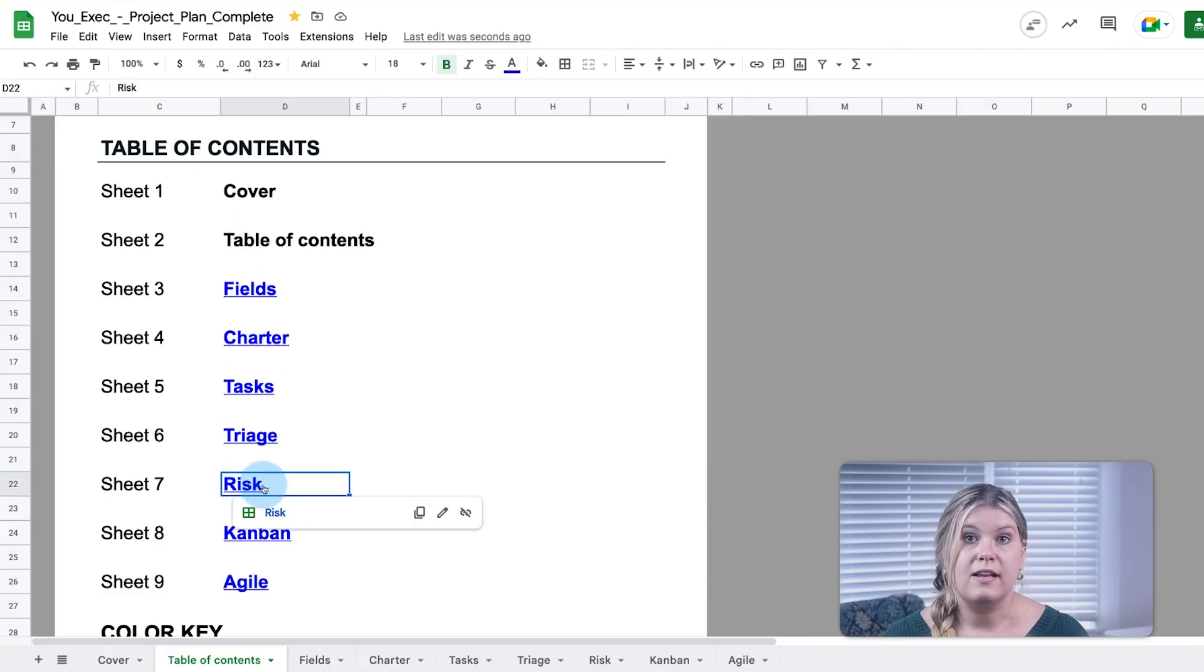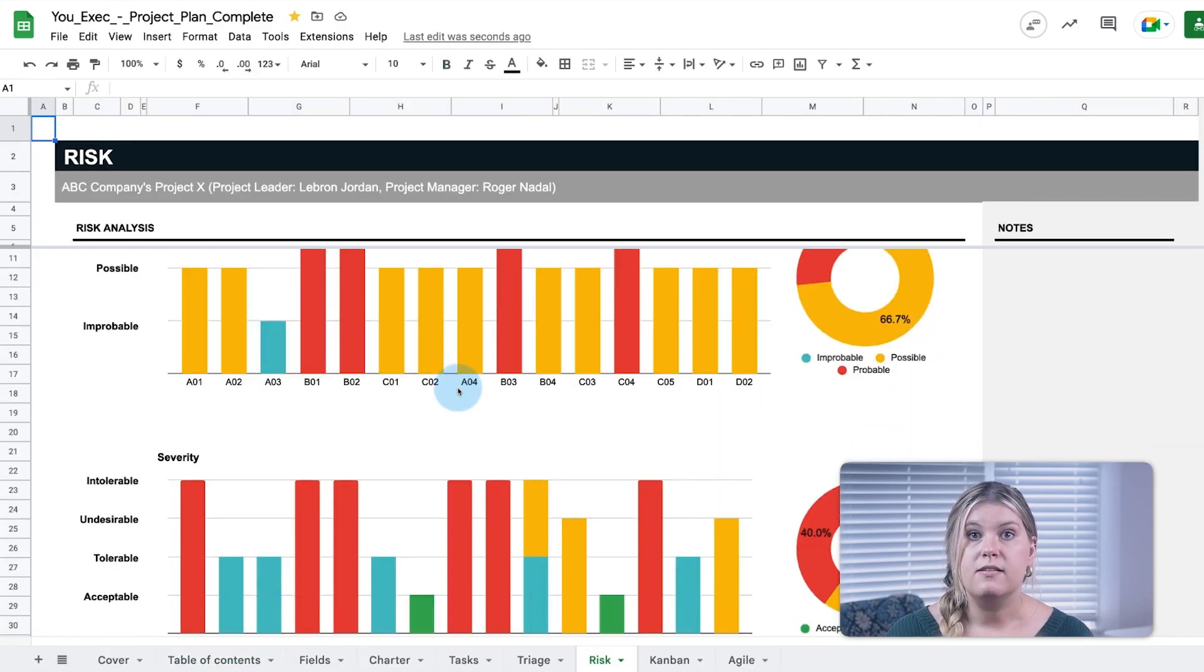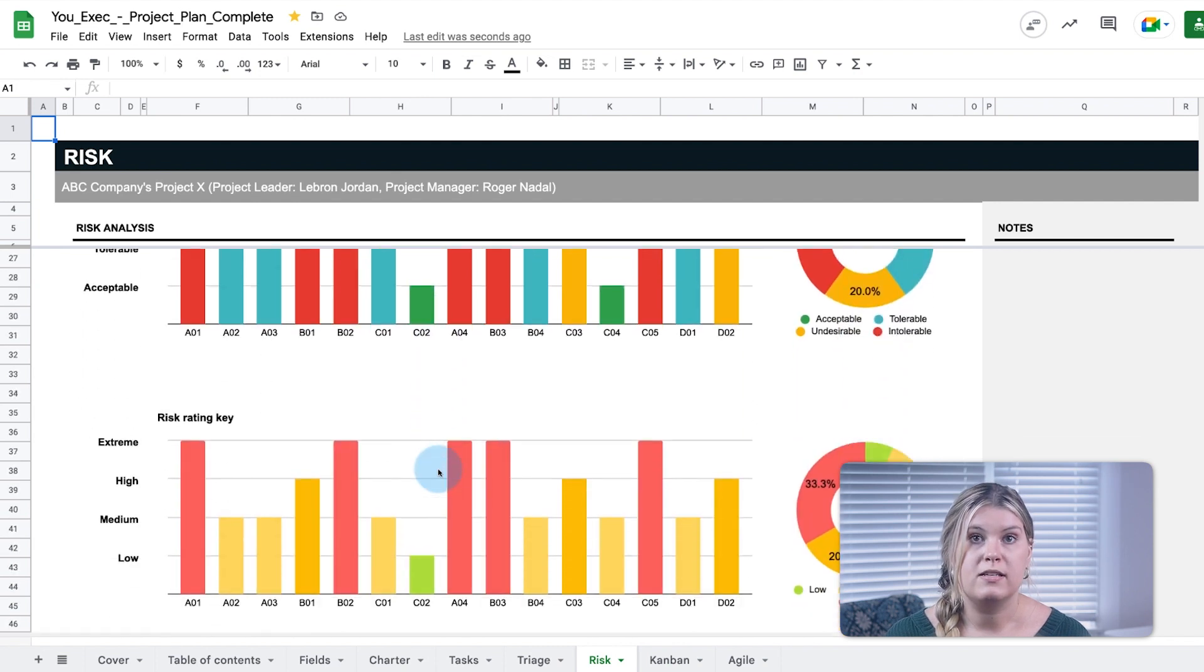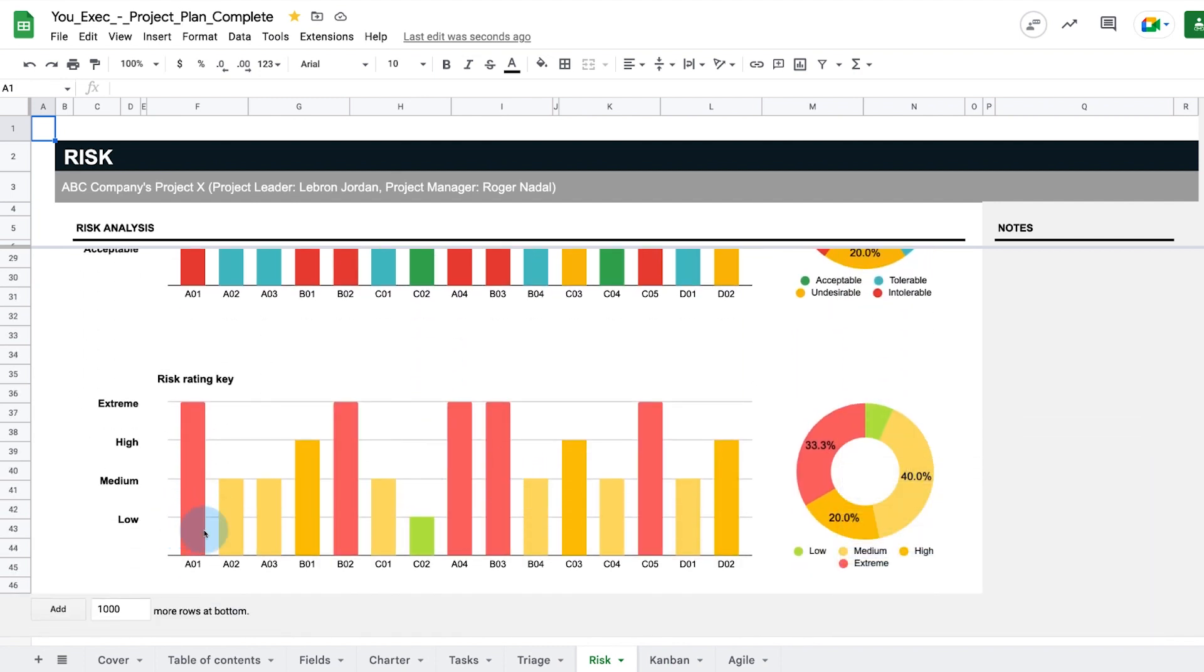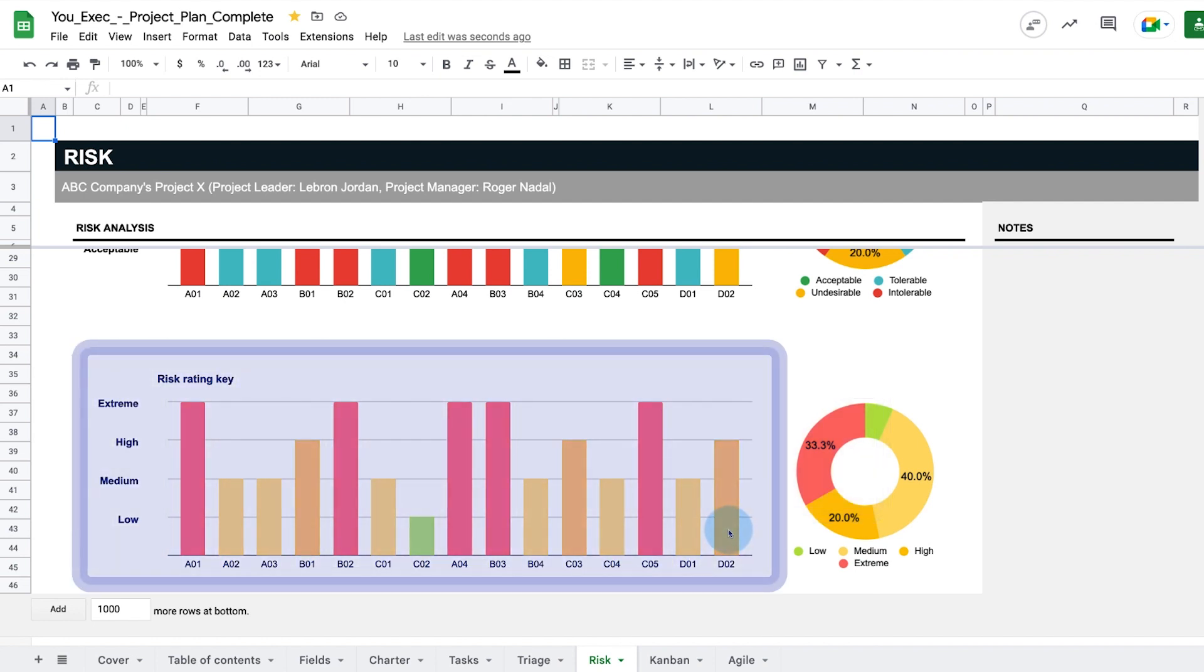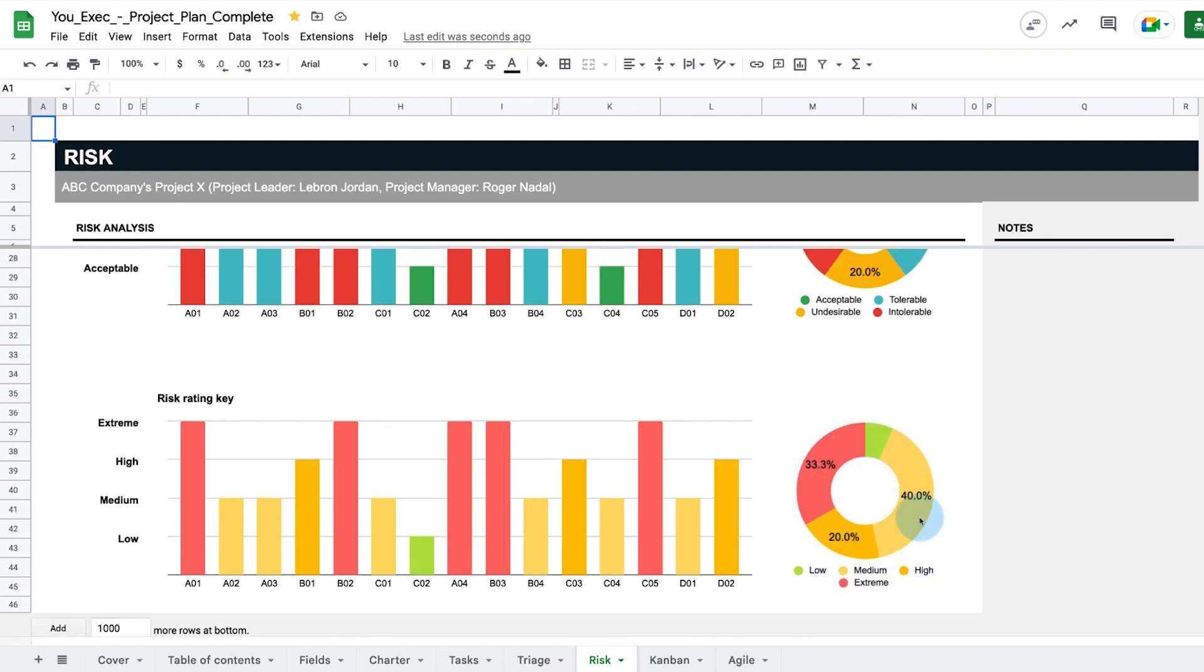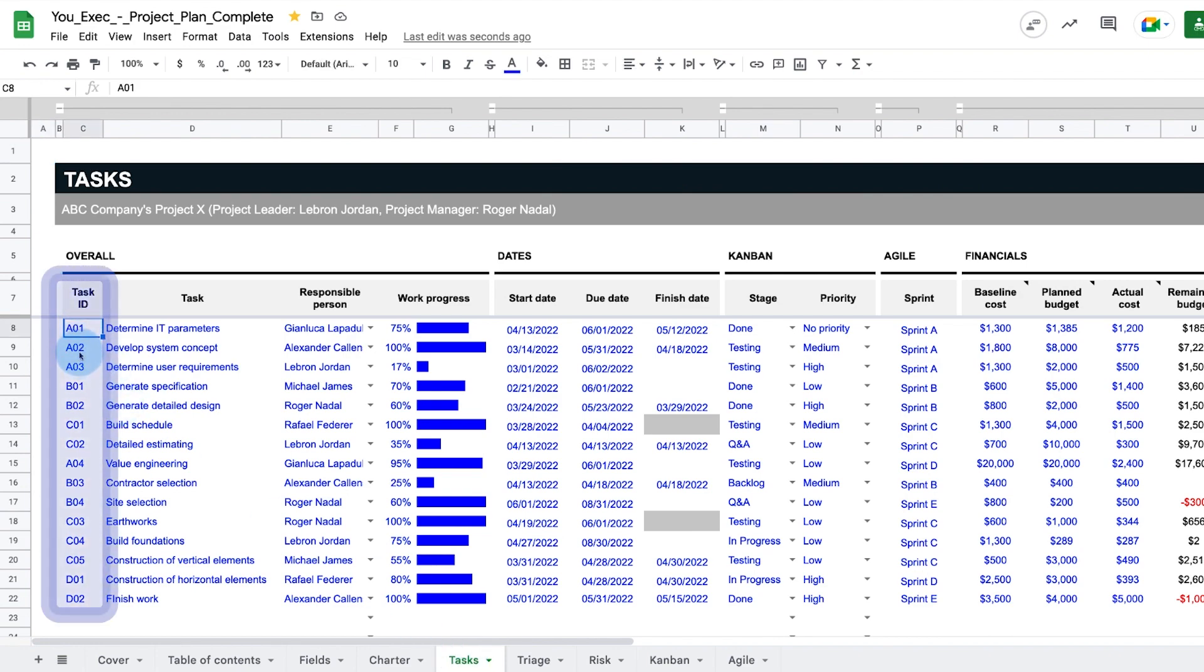The risk analysis tab breaks out the probability, severity, and level of risk across each task. The charts visualize both the individual risks that are the most likely to cause problems in the bar chart and the overall level of risk for this project with the pie charts.